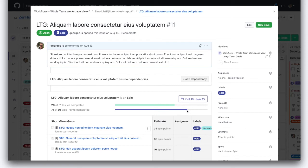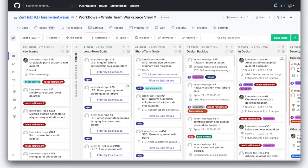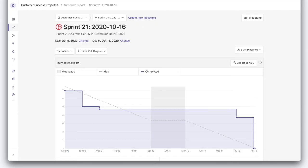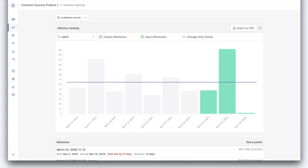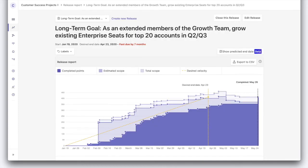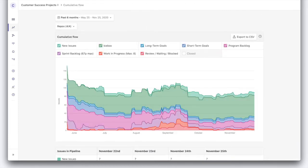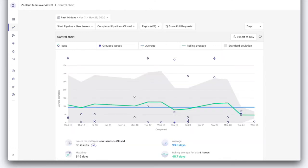In this epic, we're further along than you might think if you're just looking at the raw number of issues, because some of the remaining issues are relatively low effort compared to the work already completed. This gives you a better understanding of when the work may actually get done. In addition to the board, Zenhub gives you all the reports you'd expect to see: burn down, velocity so you can make more accurate plans and not over-commit, release reports so you can see scope change, and lean reports like cumulative flow or control chart so you can figure out your lead or cycle time.